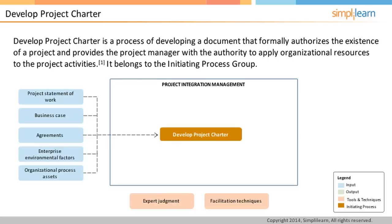The only output of this process is the project charter. The project charter usually contains the high-level project requirement and it should be created by the project sponsor and handed over to the project manager. The project manager can do the groundwork to prepare the project charter but it must be signed by the project sponsor or somebody in the performing organization who is higher in authority than the project manager.